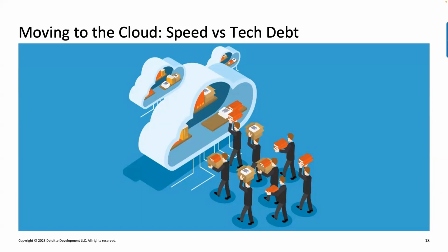Right. So tech debt is very dangerous, and how you provide tech debt treatment is going to be very detrimental to how your journey is going to be successful or not successful. Why is that? Because the moment you build the business case and you put these 3 years, 4 years into it, and you don't communicate all the way down to the developers. Developers are shiny object gaga, right? I want to go and eliminate all of that stuff. They don't care about what you put in the business case. They want to go and build all this nice, shiny object stuff, the cool stuff. And yeah, if it takes them 2 years, so be it. It's tech debt. I need to get rid of it.